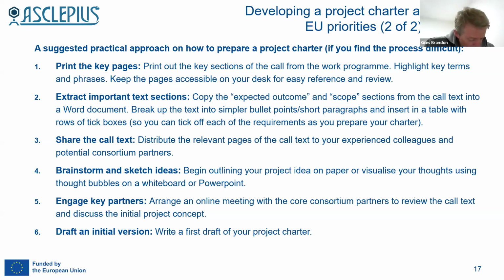The way that, for me personally, I find them presented often in the work programs, I often find them difficult to read because it's just such large paragraphs of text and somehow I get lost with them. So what I often do is I will copy the text from the PDF, I'll stick it into a Word document, and then I'll deliberately break these paragraphs up into separate sentences. I might even create a table with two columns, put the various sentences from the call text in the one on the left, and then the column on the right is kind of a checkbox.